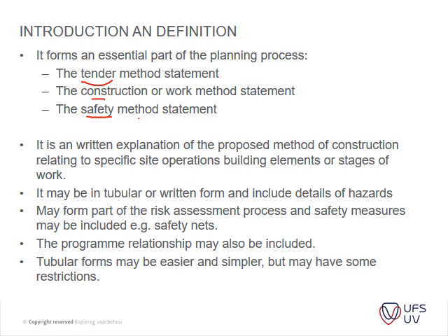Your scheduling, your program is also a method of capturing the method of execution. So usually that runs hand in hand. Your program and your method statements complement each other. It may form part of a risk assessment process and safety measures, and it may include things like safety nets and so on that you need to think of when working at heights. The program relation may also be included. Tabular forms may be easier and simpler, but may have some restrictions. So you might not be able to include as much information when you use tabular method statements.